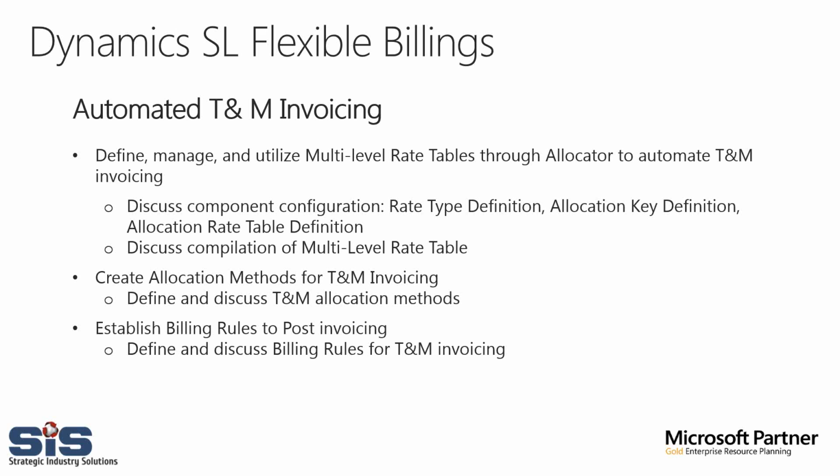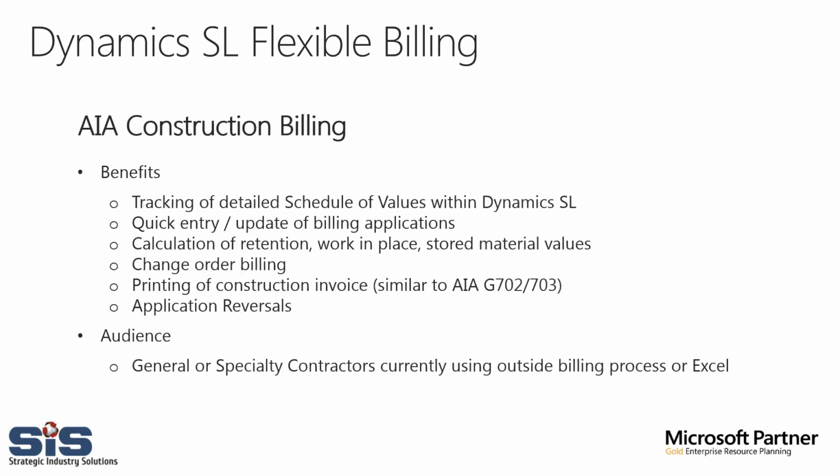So at this point, I'm just going to go ahead and move on to our fixed fee, AIA, percent complete contract, however you want to call it. Okay, we're talking about the benefits of tracking of a detailed schedule of values within SL, quick entry and update of billing applications, calculation of retention, work in place, and stored material values, change order billing, printing a construction invoice, similar to the good old AIA G702, G703, as well as application reversals.